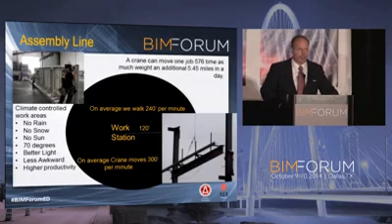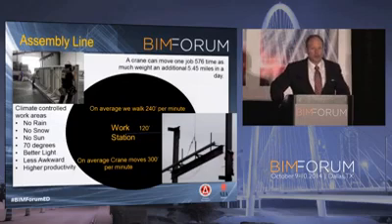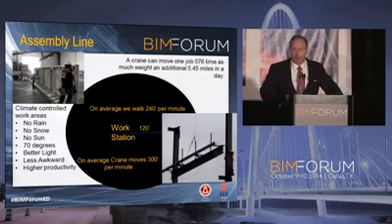Back to our assembly line. The other thing that was great about Ford was all the work came to the workers. So what does that mean? We all walk at roughly 240 feet per minute at sea level. So we're trying to cut down on the walking. Our crane moves at 300 feet per minute. We have a mechanical advantage there with our crane, and we're utilizing it. Our cranes, our man lifts, those are our assembly lines. Our trucks, we're trying to move that as efficiently as possible.